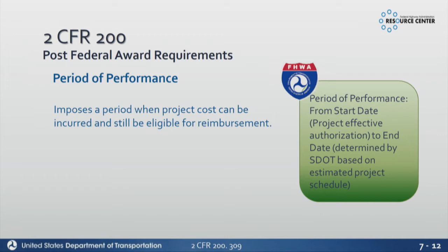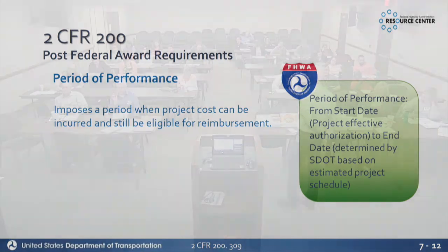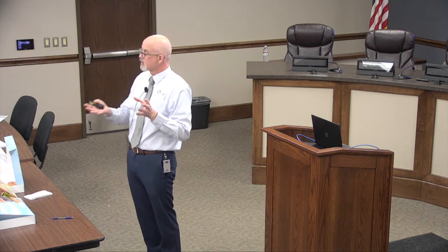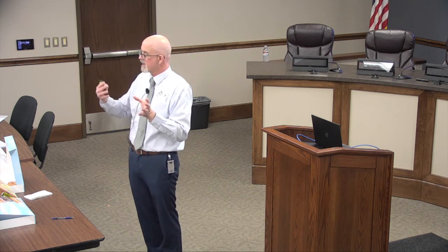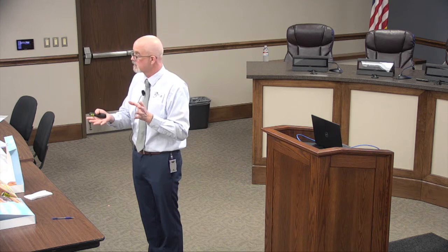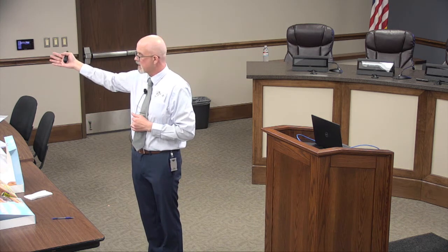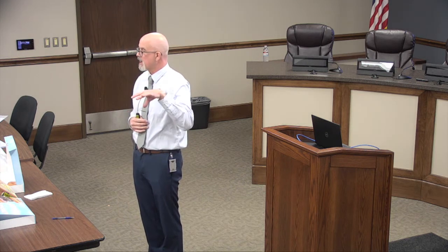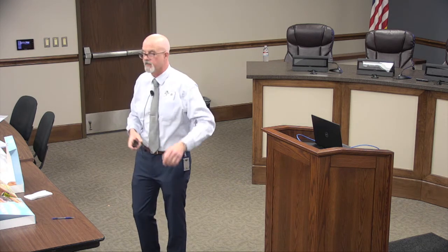Does everybody know what incurred means? It's kind of like an accounting term, because you can incur a cost without actually spending any money. So if you have a contractor, they're doing the work, and they did it on September 27th, and they haven't sent you a bill yet, it was incurred on September 27th. And let's say September 30th is your end date. Well, you can bill those costs in October and still be okay, because they're for costs that actually happened within the period of performance. So that's what that means.